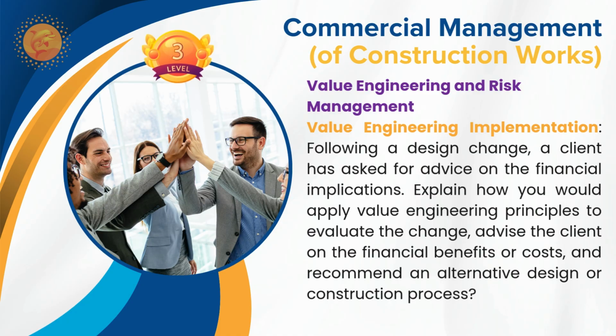So if you change the design, then if it is additionally expensive, they will inform the additional expense. If it is cost savings, then they will pass on the cost savings due to the changes. If there is an impact in the time, then that will be a compensable delay or a non-compensable delay. They will get both from the contractor. Then they will assess the value and pass it to the employer. Then the employer would take an informed decision to go ahead with the change or not. So that is the scenario.